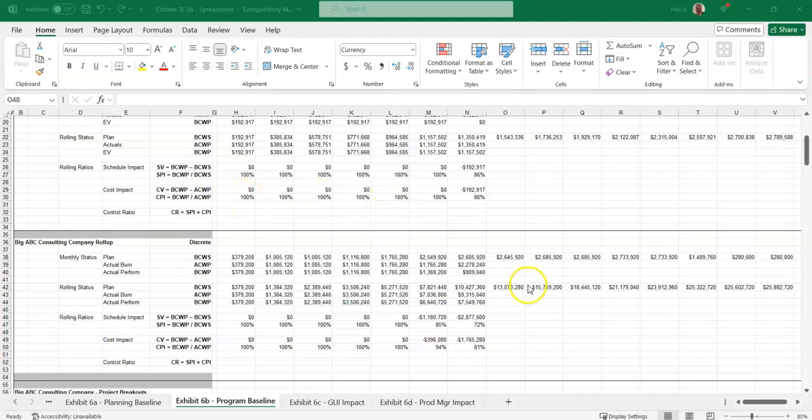And that's done basically because if you come down here and you see a cost variance of 1.76 million, you would say, wow, that's a big number. But if you had a $100 million program, wouldn't be as big as you think, would it? So the ratio CPI is a better metric because you can see it as an efficiency and see that you're running 81% over budget. That would be a problem at completion if you don't recover it.